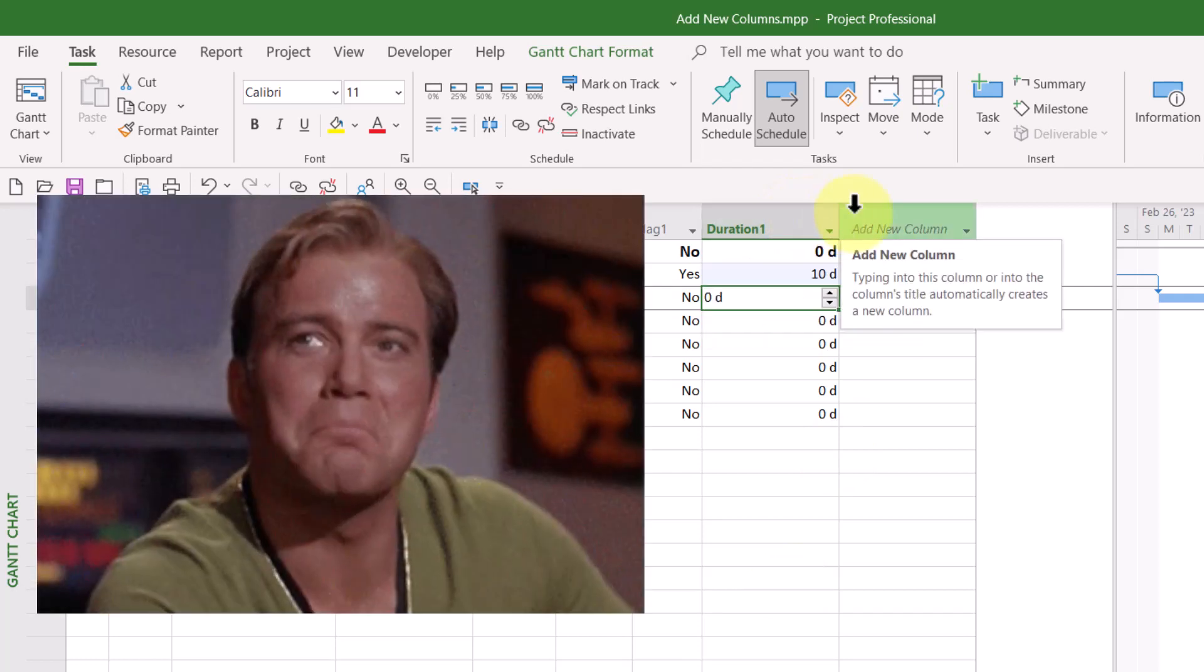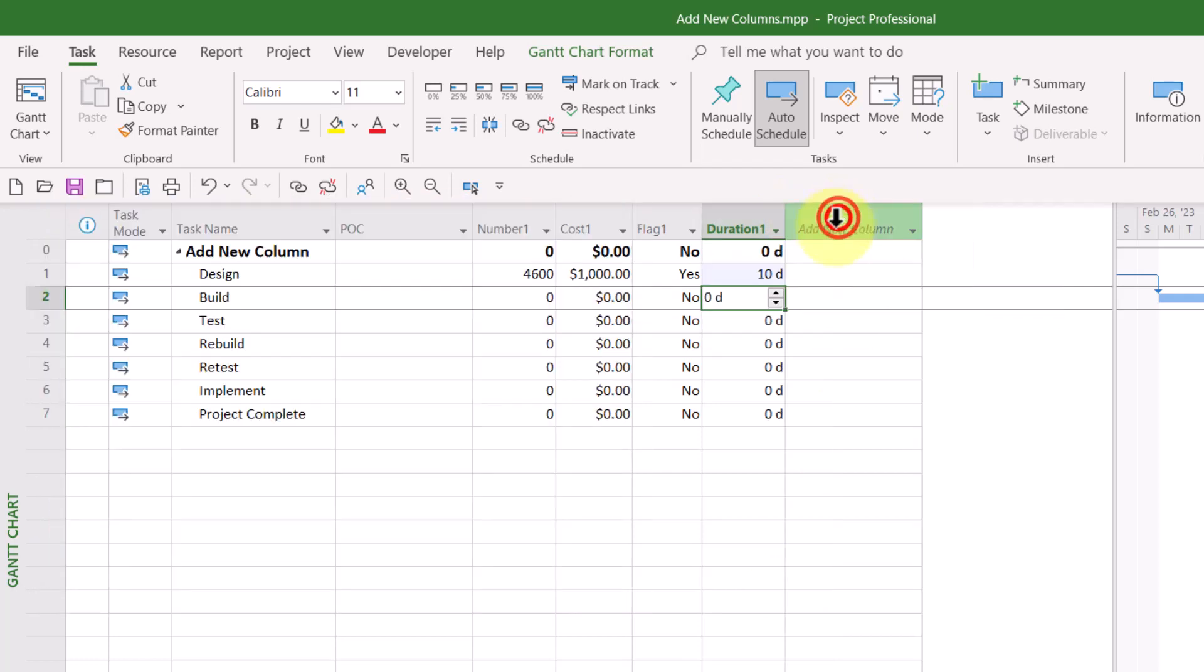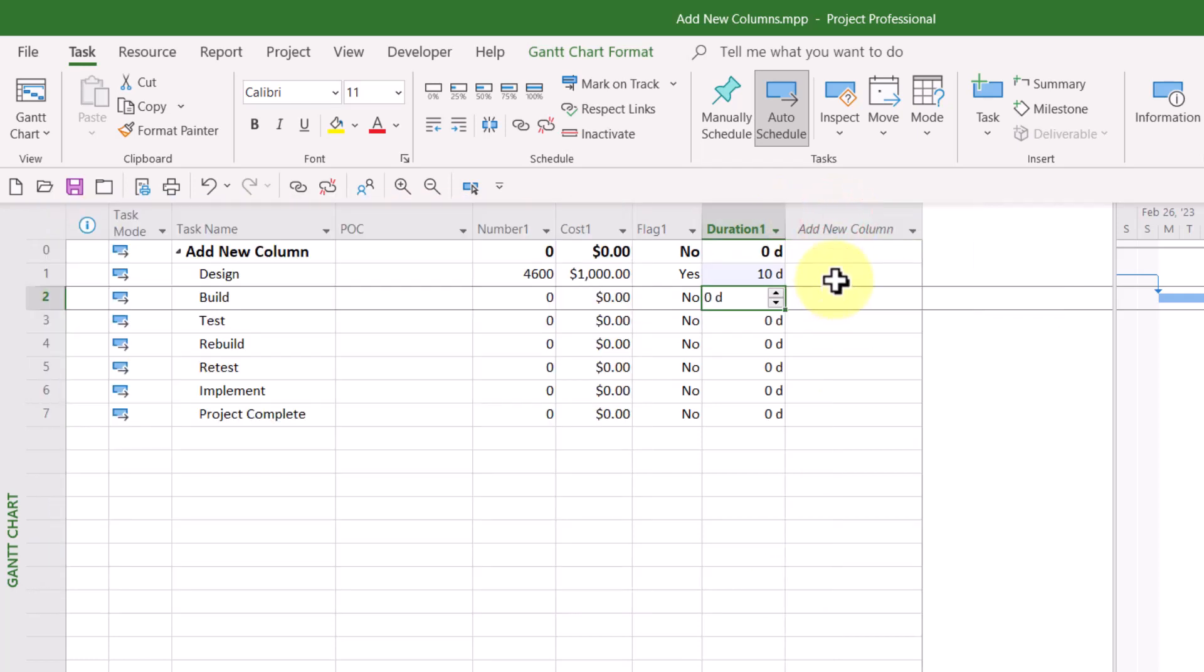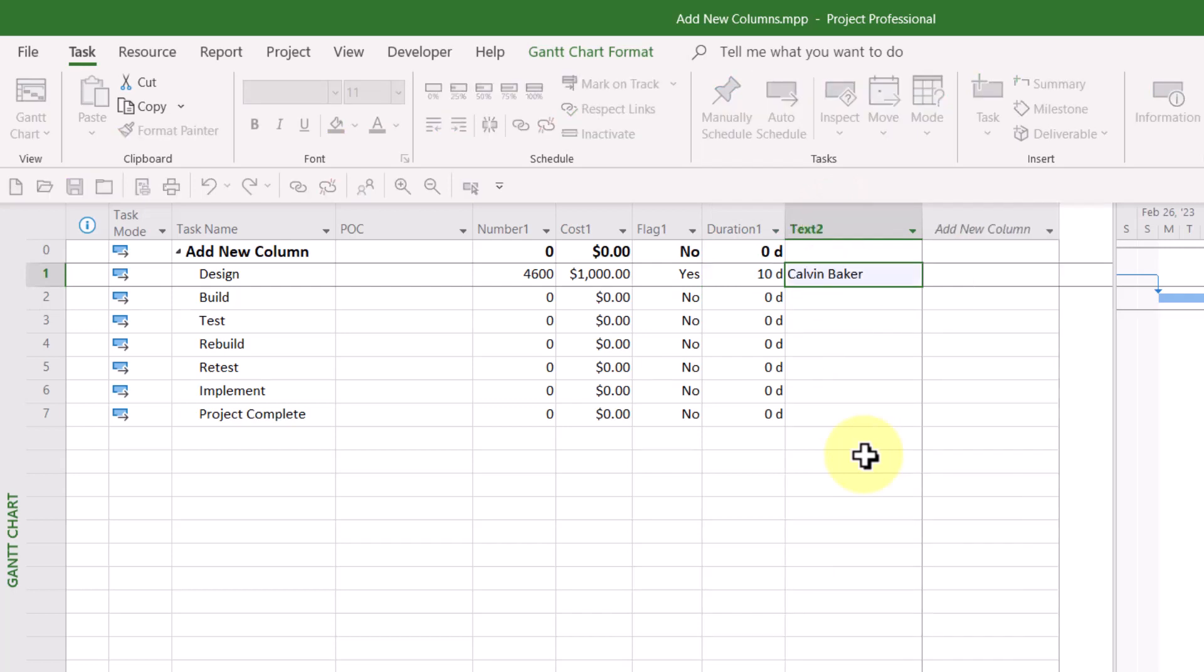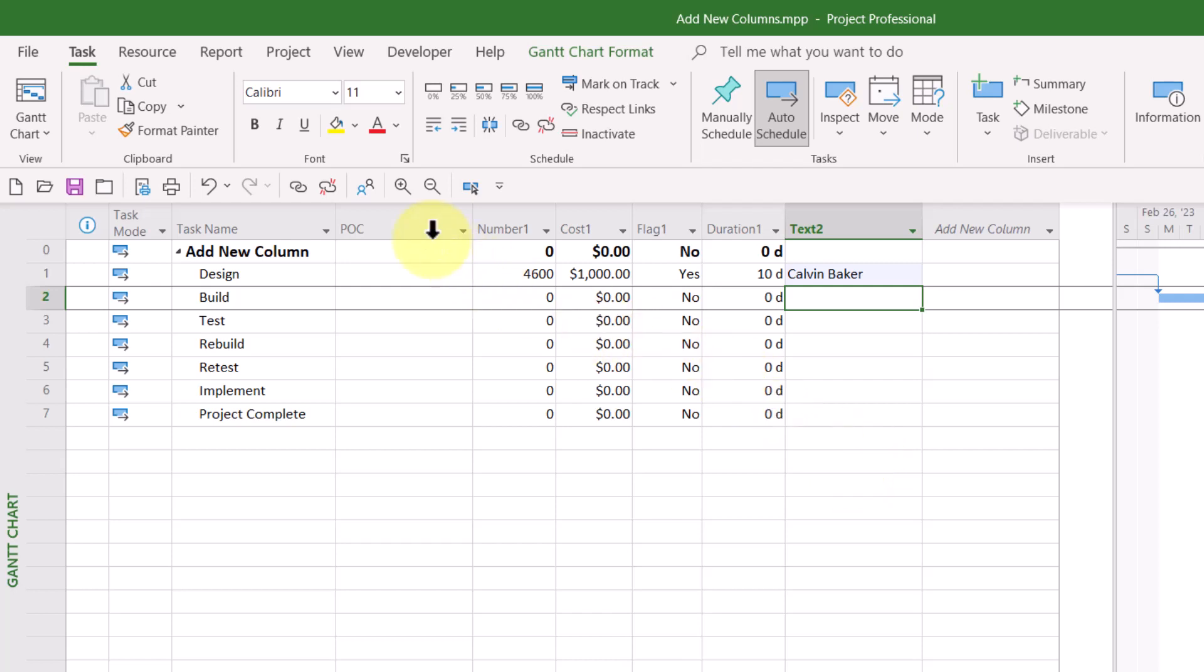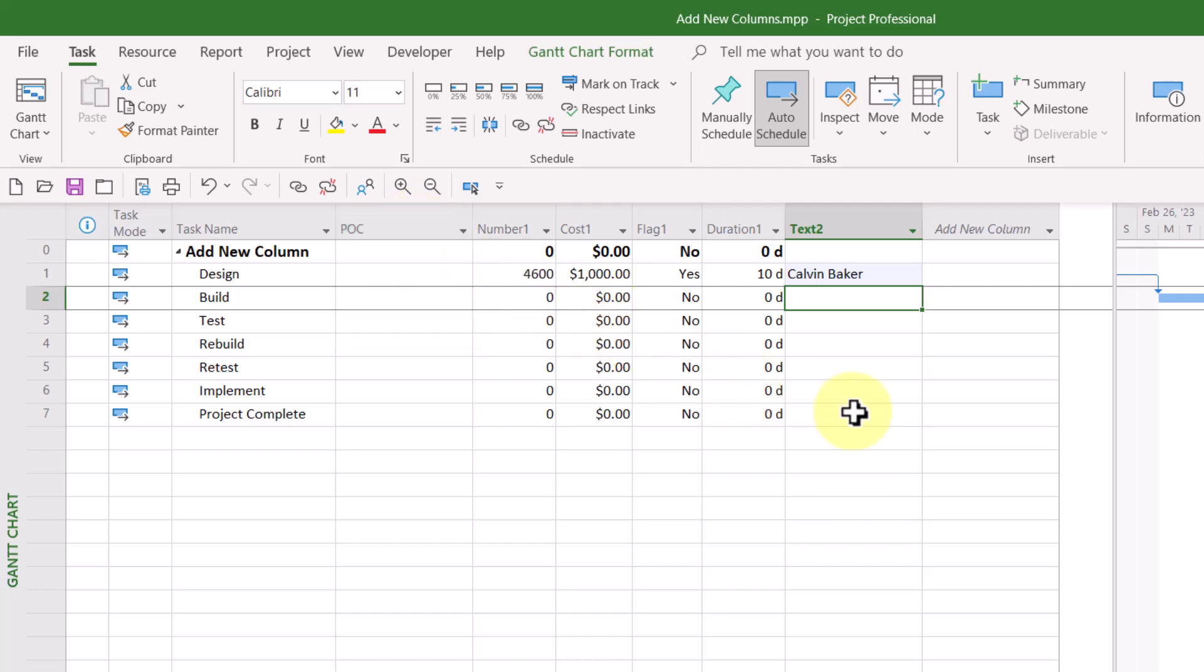And then finally, if you were to type text information, such as a name like Calvin Baker in the Add New Column Virtual Column for a task, you will discover that Microsoft Project once again will insert the first available text field. In my case, this is not text one, it's text two. Why is that? Remember that text one is already in use as the POC field.